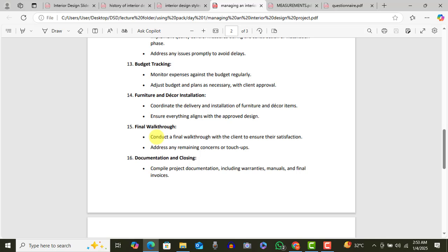When you are done with the work, let there be a final documentation. So let the client sign something. We embarked to do a 3-bedroom for you. It's been done. You've done your final inspection on so and so date. You found everything as you want it to be. You are signing that you've received, handing over, everything is in order.